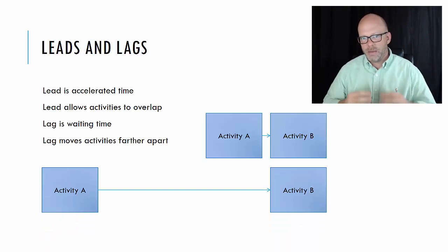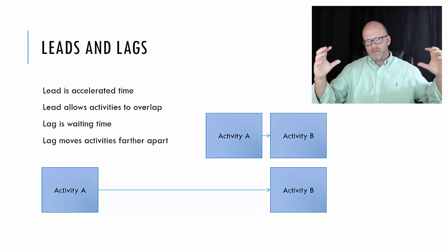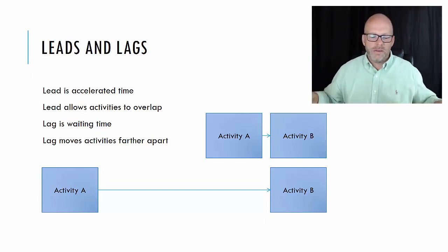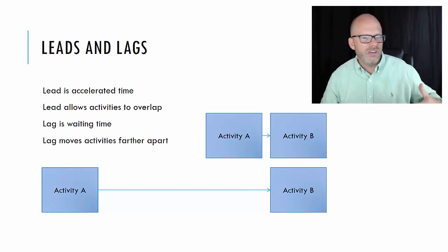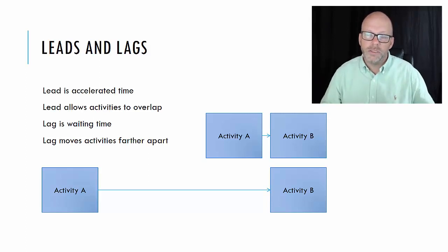Lag time is just the opposite. It's waiting time; you add lag time to move activities further apart. So lag time could be, we have poured concrete, it's really humid, it's really hot out, it's taking longer for the concrete to cure, to harden, before we can start building on it.